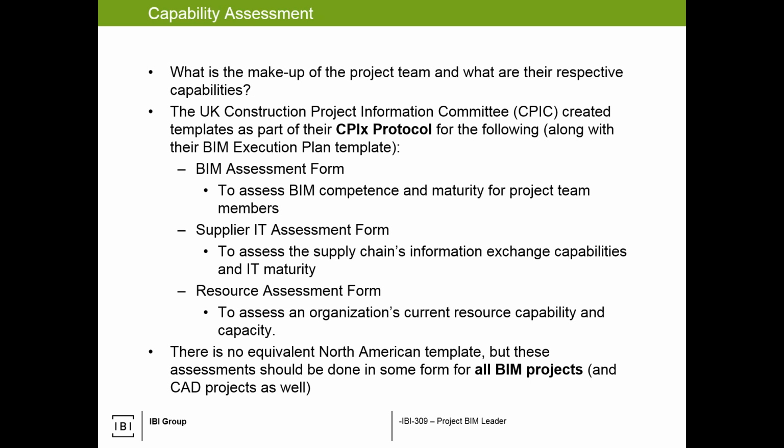If we all agree, you know what, yep, we've got licensing, we all know what BIM is, we're good, but we need training. Nobody's used Revit before. Nobody has used ProjectWise. Nobody has used MicroStation. Then at least we can identify up front. In order to succeed, a training regime will have to be put in place. And in that regime, we may define focused efforts in order to target the training to ensure success, complementary to the requirements of the project.